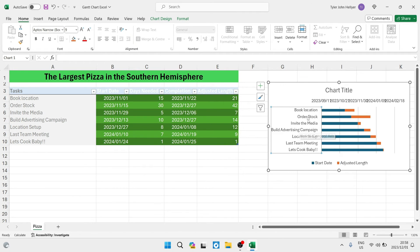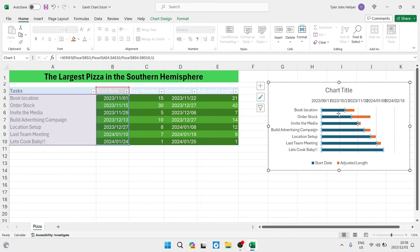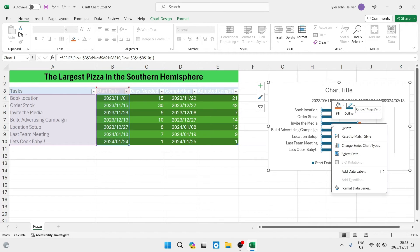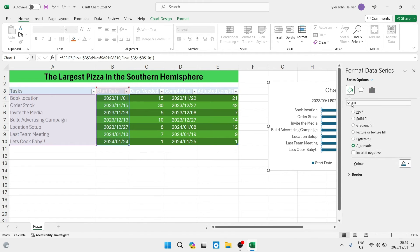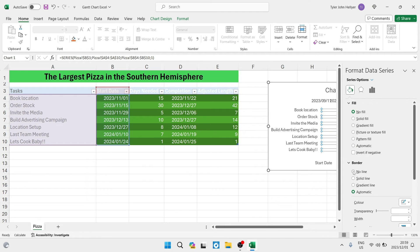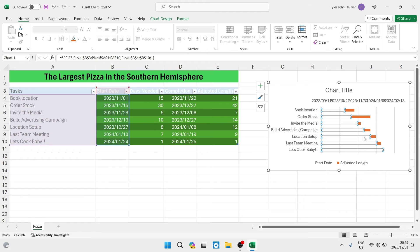Next, tap on the blue bars on the chart — it highlights everything. Right-click and go all the way down to Format Data Series. The first icon you'll see is Fill and Line. Open up Fill and select No Fill, then look at Border and select No Line. That's the setting you need. Close this window and you can see that your chart is now even more legible.